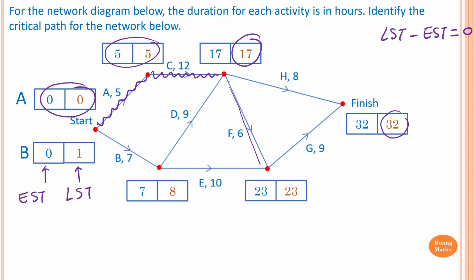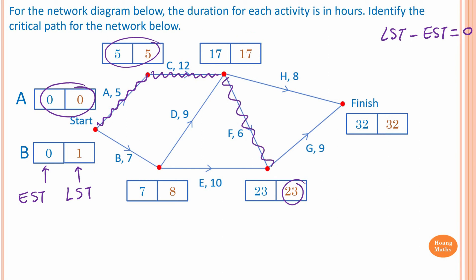The correct path is this one here, because 23 minus 6 is 17. So it's activity F, not activity H — please take note and do not confuse them. The next activity on the critical path is activity G. Therefore, the critical path of this network is A to C to F to G.